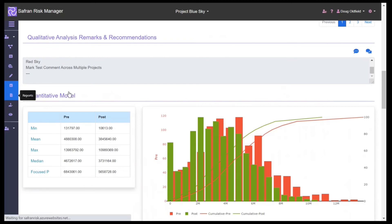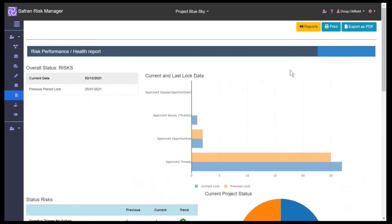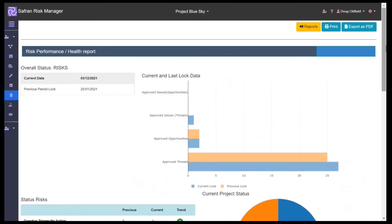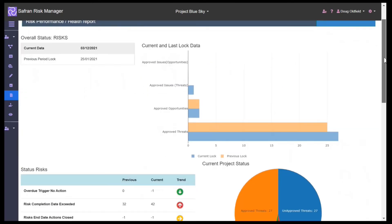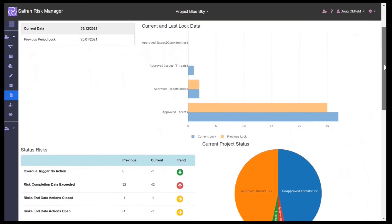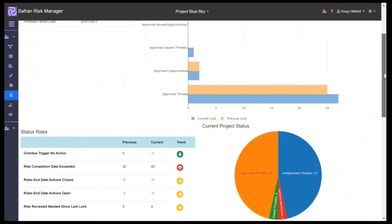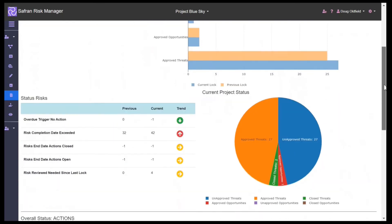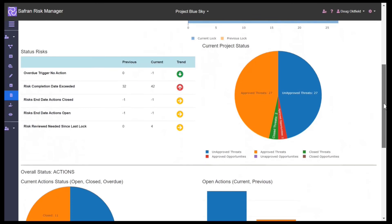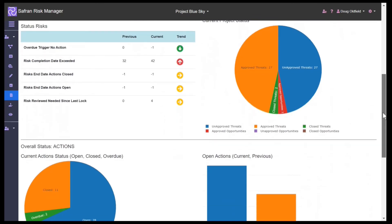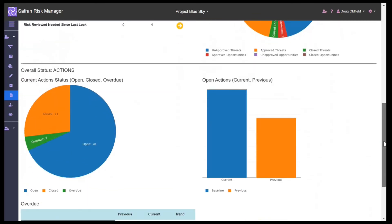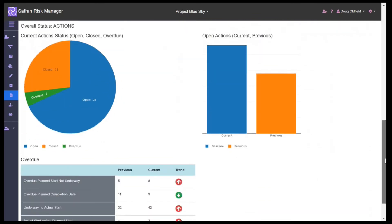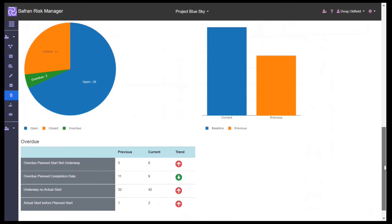We can see the individual reports we have on our actions, contingency drawdown, and here the risk performance, which is a time-based report showing how many new risks or opportunities or actions have been added or closed out, and what our trend looks like over time. Again, this is a live report based on real-time data from our users.